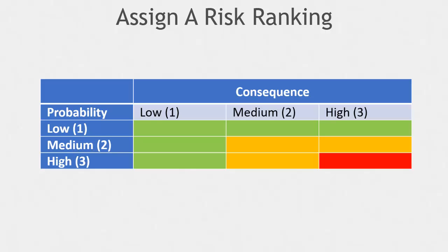We use a risk matrix or a heat map to record the votes. You can use as many categories as you like for the consequences and probability. And you can have quantitative definitions of the categories if you like. In fact, categories can be developed specifically for each risk. Here in this example, we use the simple categories identified earlier.